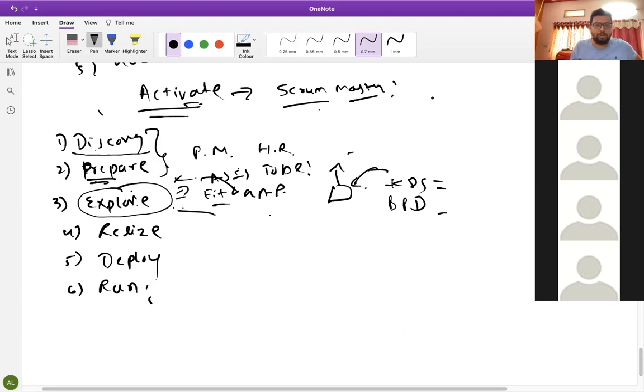This is the KDS document, this is how we want to do it for the business, this is how I have to do your configuration. So every week we will continuously take feedback from the business people. We need to attend weekly meetings and take feedback from the business side. Accordingly, we will configure things so we will not face any problem once we go to the realization phase.